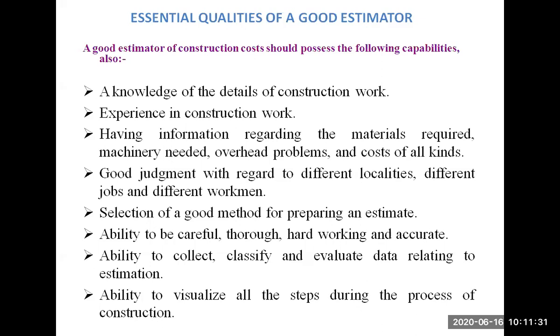Then overhead problems. While working on the site, you are going to face many problems. These are not mentioned anywhere in the book or the plan, but while actually working on the site, you face such problems. The problems are related to safety, and to the transportation of the material. If you are going for a G+10 building, or even a G+5 building, and you don't have a ropeway to carry your material from the ground floor to the fifth floor, that is a problem.